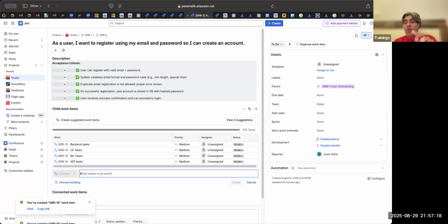Which means apart from UI, all the corresponding components like database, Java, backend, whatever is required to complete that functionality. Typically any functionality will have layers. It could be two, it could be three, it could be more, but typically it has two or three layers: UI, the middle layer, and the backend layer. It needs to have all the layers so that the entire functionality works. So now this registration story is a 5-pointer.